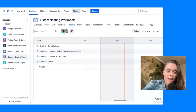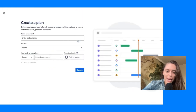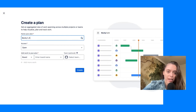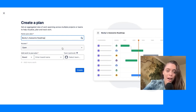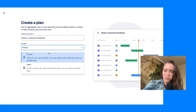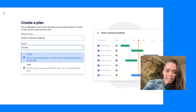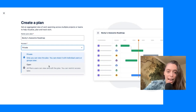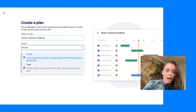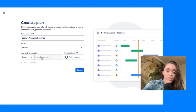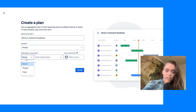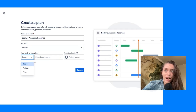Here I am setting up a plan — otherwise known as an Advanced Roadmap — because I have a Premium subscription in Jira. I'm going to name it something generic and give myself private access initially. As you can see, I'm able to restrict who can or cannot access it. This is really the key part: I'm able to choose what boards — plural boards — I'm going to visualize in this roadmap, which is the crux of what makes Advanced Roadmaps an option for those who want to look at things on the Epic level.